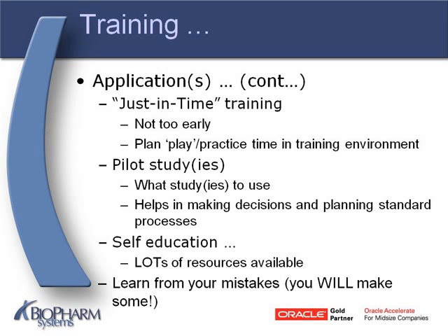Pilot studies, I think, are very, very important also. You can use one of your old legacy studies that's done and finished in some legacy system and use that as a pilot, and how would you set that up in OC? Or you can use maybe some new small non-submission study that you have going on. Or in lieu of that, one thing that BioPharm does when we do pilots with clients, we have developed our own pilot study that kind of utilizes a variety of different types of CRFs and utilizes all the different features and functionality. So it's a pretty good, pretty broad pilot study that people can use.